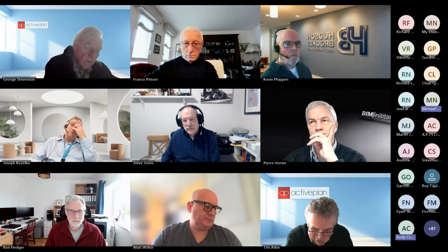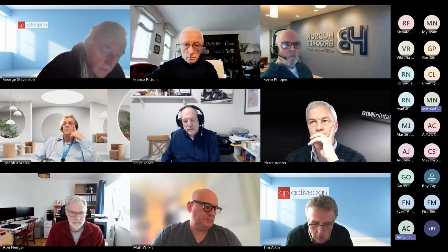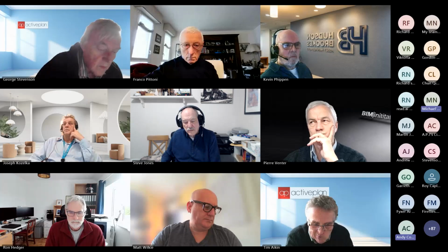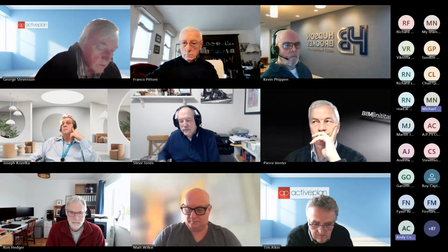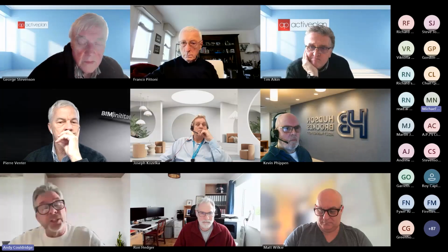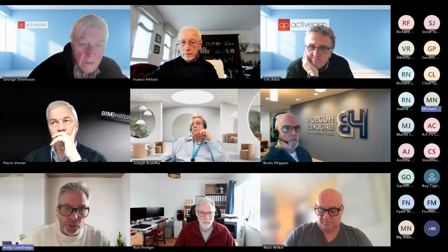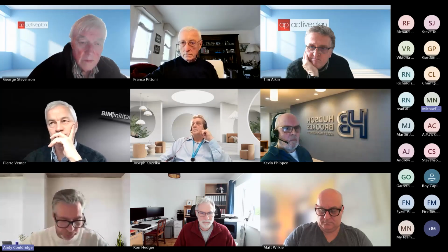Yeah, I think one of the things I've raised on previous calls is that, dealing with the Regulation 38 handover, the digital handover, I'm evidencing the fact that most of what I'm receiving isn't an as-built document. When I challenge it, the observation that I'm raising is that it's not an as-built, it's not what we procured. We didn't procure an as-built, and I've raised that before.